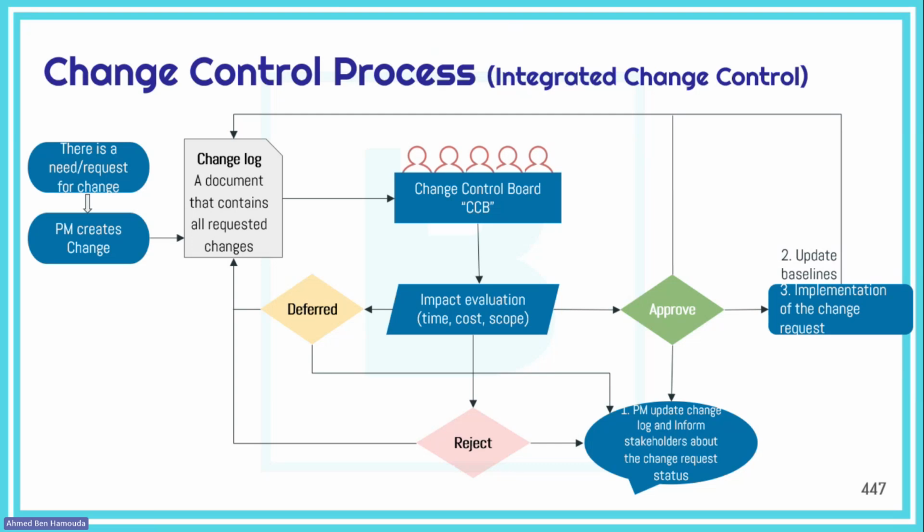Usually, we have this weekly, bi-weekly meeting with the change control board. Sometimes it's an ad hoc meeting depending on the need for it. But usually the change control board prefers if we gather all the change requests to present them in one meeting, so they don't have to gather more often, since they are really busy people.